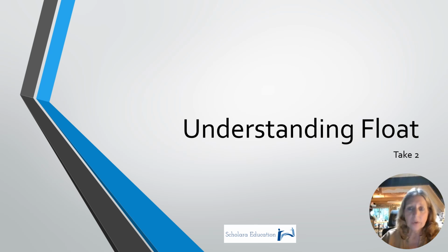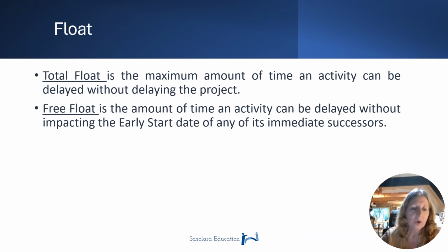In this video, we're going to talk about float. And float is the wiggle room or the slack a task has in our schedule. Total float is the maximum amount of time an activity can be delayed without delay in the project. Free float is the amount of time an activity can be delayed without impacting the early start date of its immediate successor activity.